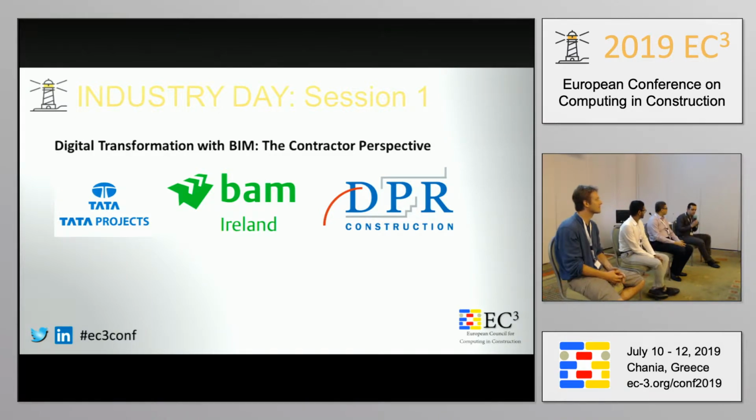I would say we have a similar approach as DPR, but what we try to do also is to implement that in the BEP, the BIM execution plan. So any subcontractor or anyone that is coming to work with us, they know that they will have to provide a BIM model. In that case, we try to not enforce, but at least filter the subcontractors in a way that we know that they are able to deliver what we need.